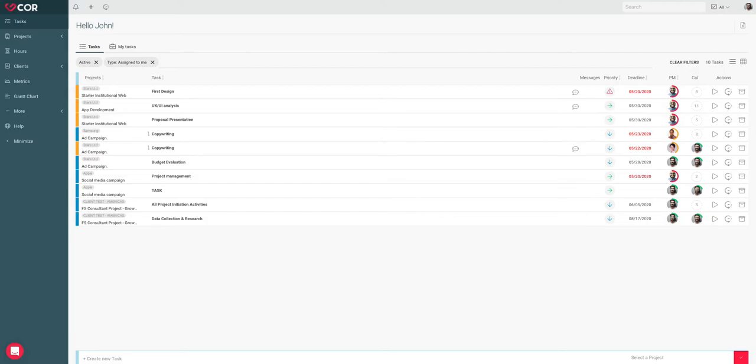It is important to understand how much time is dedicated to each task, as well as to reworks requested by the client. This will also give you visibility over the current availability of the team to execute these tasks. It will make it easier for the project manager to determine if there are a lot of tasks for the week or if it is still possible to assign a new task. Core has 3 different ways to track hours.